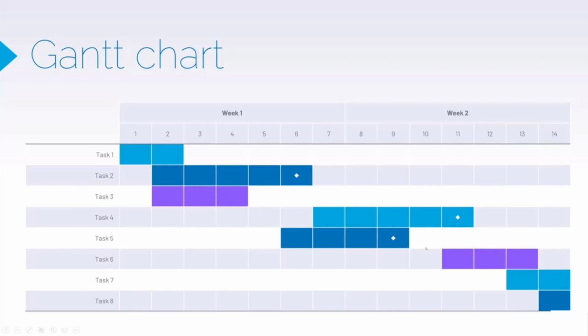Like I said, everything has been planned beforehand and is expected to follow the defined plan. If something happens and causes delays in the execution of any of these tasks, let's say that task 1 is assigned 2 weeks to be completed, but instead of week 2, task 1 is completed in week 3. Since task 2 is dependent on task 1, task 1 will complete in week 3, and up till then we cannot start task 2 and task 3. This is because they are dependent on task 1.